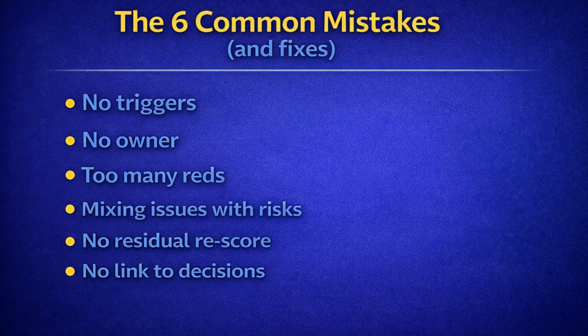Next meeting, ask: what are our top 3 red risks? Who owns them? What is the trigger? What is the next dated action?